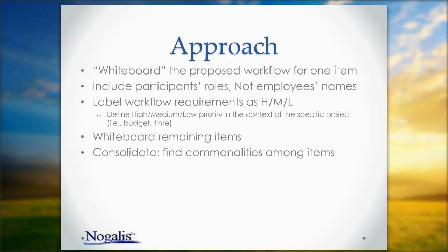Include roles, but never use named employees. It may be that in practice, there will be several roles done by only one person, but that should not be documented here. Doing it this way will accommodate growth, mergers and acquisitions, and turnover.